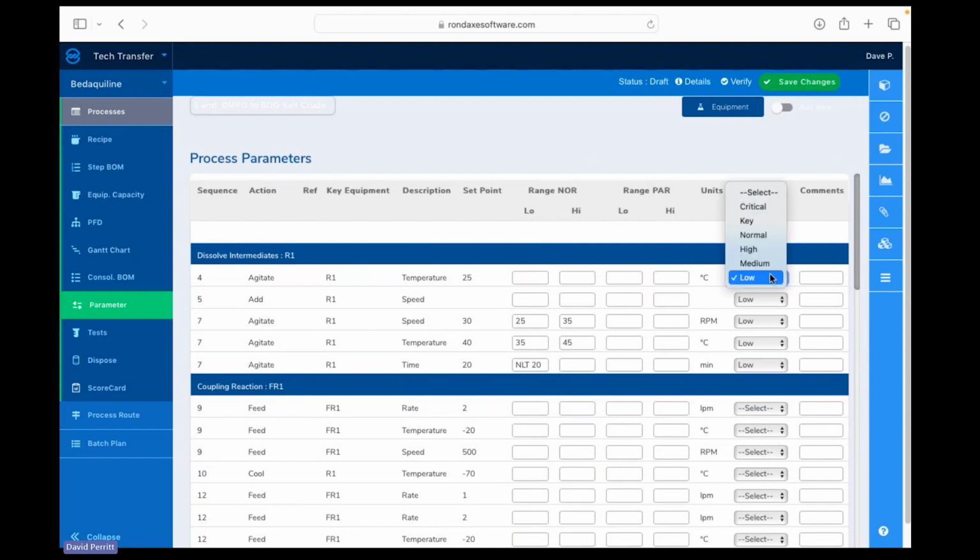Now we're going to get into the start of the QRA. So we have a risk assessment here. When we go right into the risk assessment, what we have done with multiple clients of ours, in the start of a project or the beginning when we're discussing things internally, we have low, medium, high as far as what we want to do with each step. Which one do we want to look at? Which one do we want to make sure we review? Which one do we know is completely fine and we want to just have a low risk to it? We can assign those details there. If we're later in the project, terminology we use is normal, key, and critical. So we can assign these as well. And also with every one of these, we can put a comment into each and individual one of these steps.